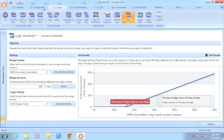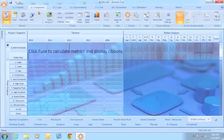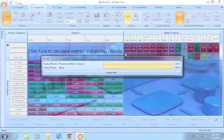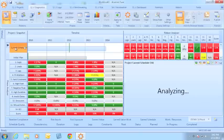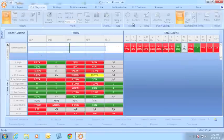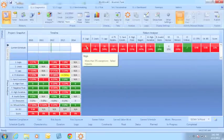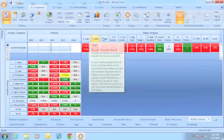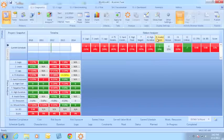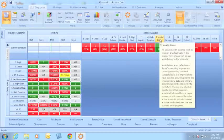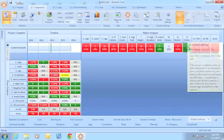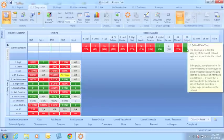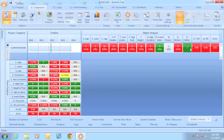Similar to the logic sensitivities test, we've now rounded out the DCMA 14 point assessment with the critical path test. Let's look at my current schedule. I can now see I have the traditional 14 point assessment checks that have been in Fuse since the very first release. And now you'll see check number 12, the critical path test, and I can show that either this group of activities has passed or failed that check.